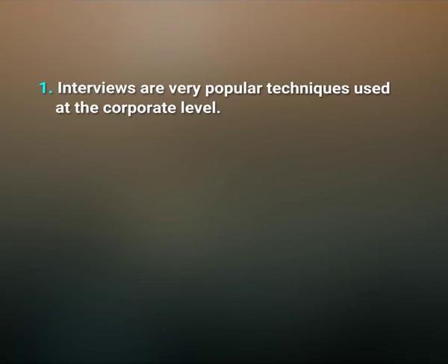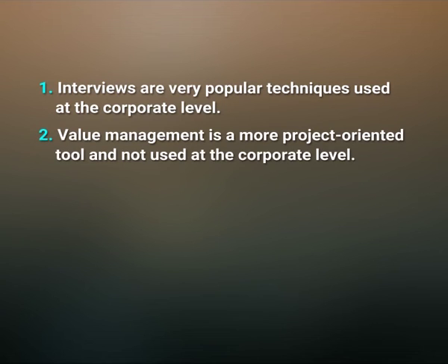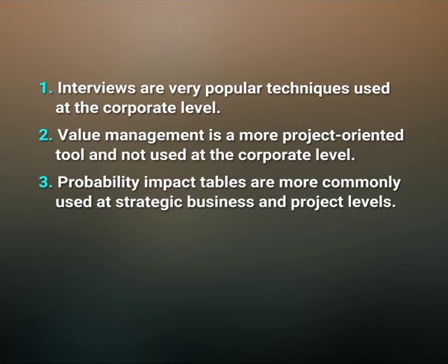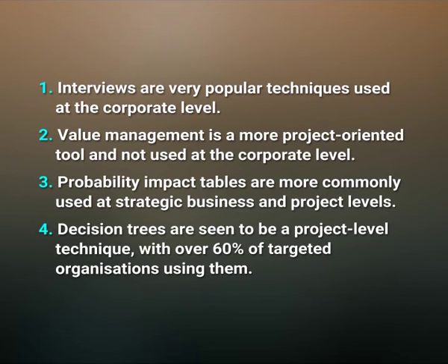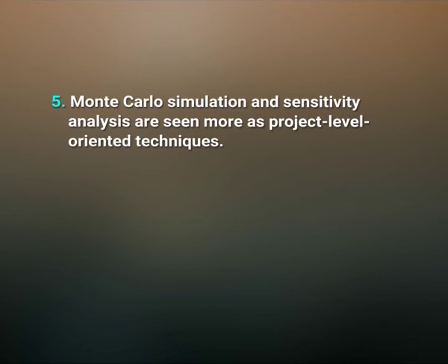The risk management techniques used at the risk analysis stage are as follows. Number 1, interviews are very popular techniques used at the corporate level. Value management is more of a project-oriented tool and not used at the corporate level. Probability impact tables are more commonly used at strategic business and project levels. Decision trees are seen to be project-level techniques, with over 60% of targeted organizations using them. Monte Carlo simulation and sensitivity analysis are seen more as project level oriented techniques.